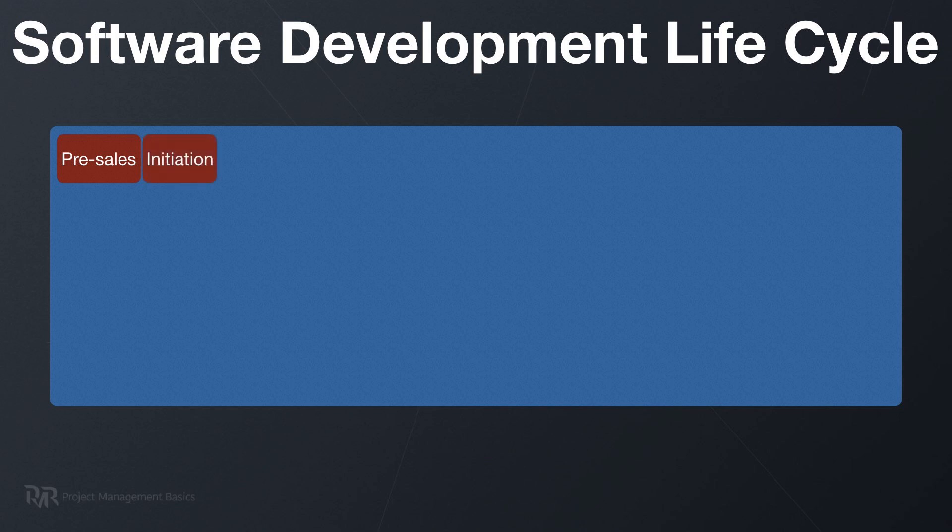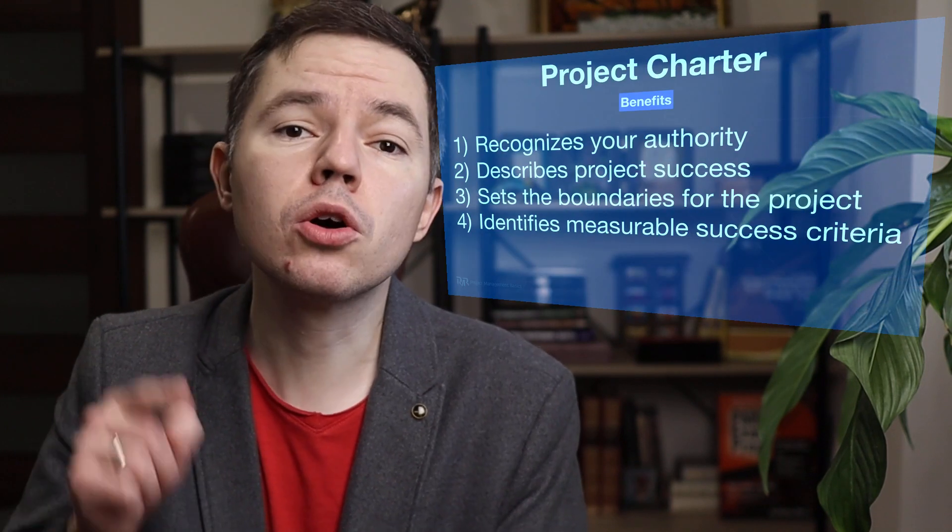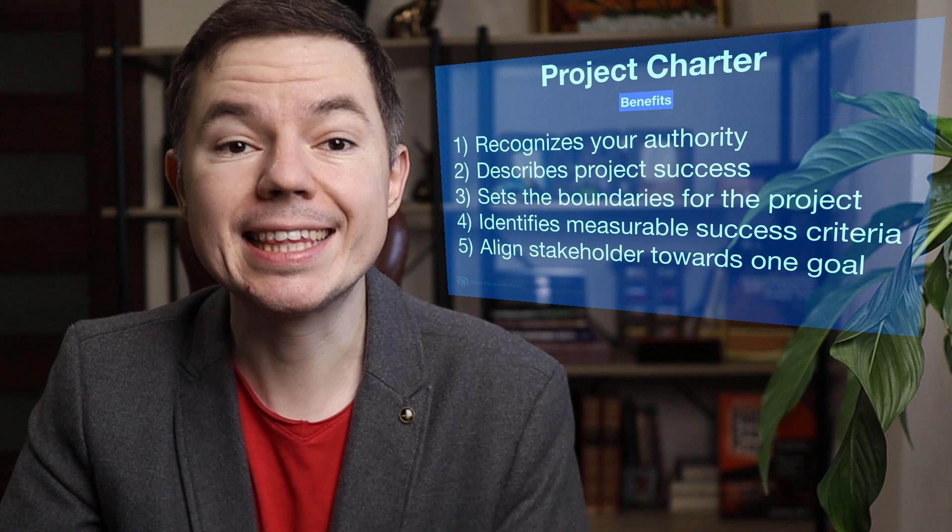After the contract is signed, you get into the initiation phase. Here you need to identify what the goal of a project is and its success criteria. Even if you are under a time and materials contract, it's vital to get through this phase. Therefore, you need to create a project charter, or at least define the key information that it has. I have an in-depth video on the project charter and I strongly recommend you review it next — I'll leave a link in the description.